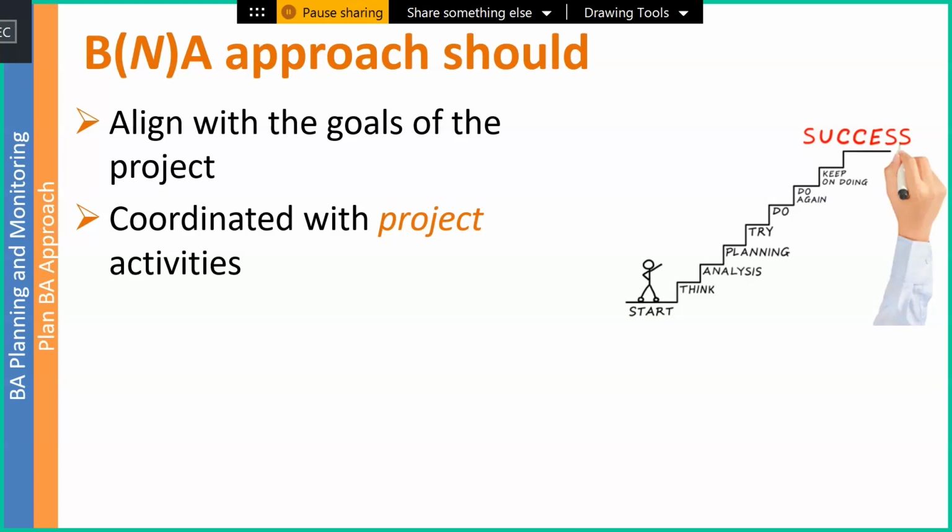If it's something where we're trying to respond to customers' needs and they're going to leave us soon if we don't take care of it, well, that's going to be a more adaptive approach to that change. So I'm going to try to figure out, based on what we're trying to accomplish and the challenge that we're dealing with in the business, should I do predictive or adaptive? And once I figure that out, I need to make sure that my approach is taken into consideration with all of the activities of the project, or the change, with the activities associated with change.